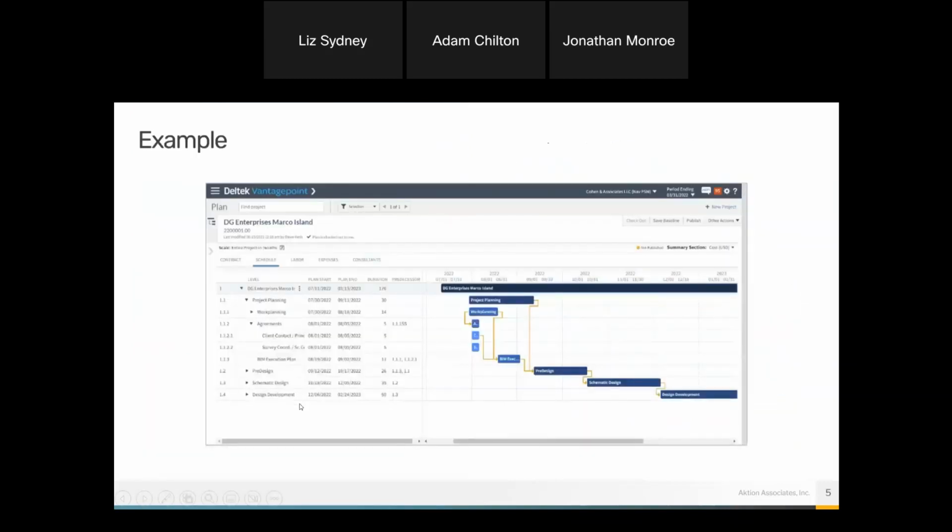And this is the schedule and the resource planning. This probably looks pretty similar to you if you've already seen it, but when you add a dependency to the schedule, it adds this gold connector between the lines, and you can actually determine the flow of the relationship, which way, if a program has to start before the next one ends, and you can time that critical path now, which is pretty amazing.